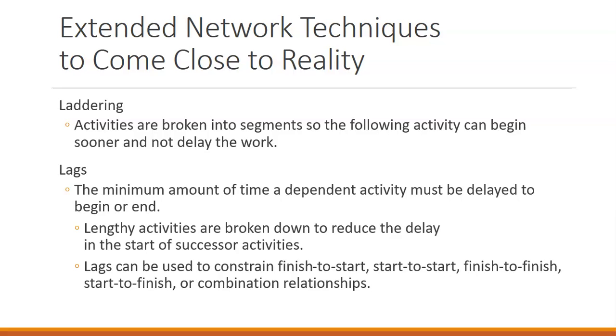We can use lags to help constrain the days that we have available between blocks. So for example, if we have a 25-day activity, we're going to want to break that activity into smaller segments so that we can keep better track of what is happening in those 25 days and what potential lag might occur in those 25 days.